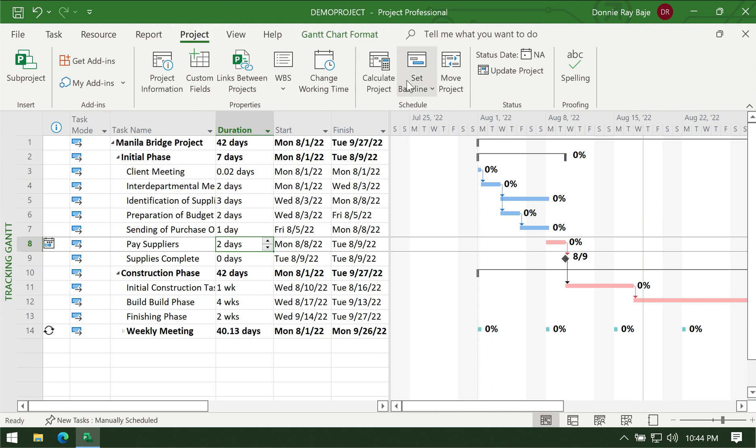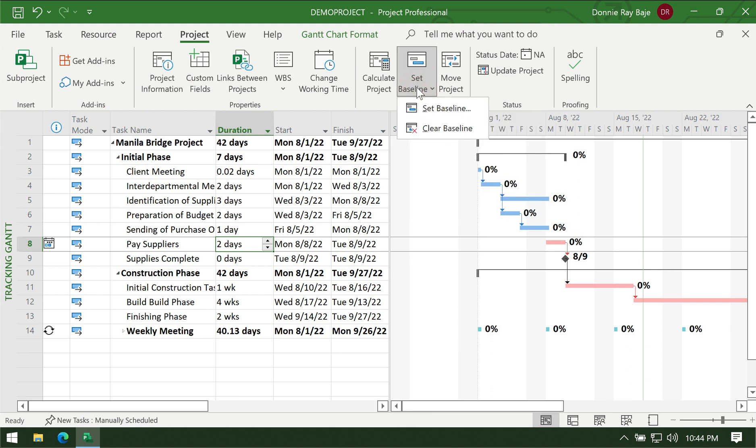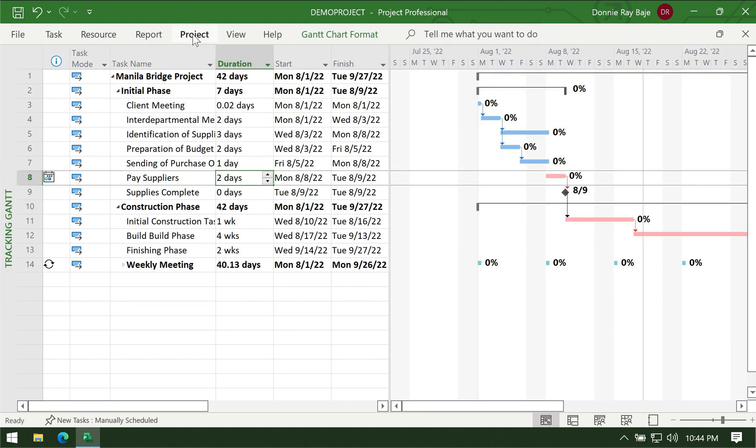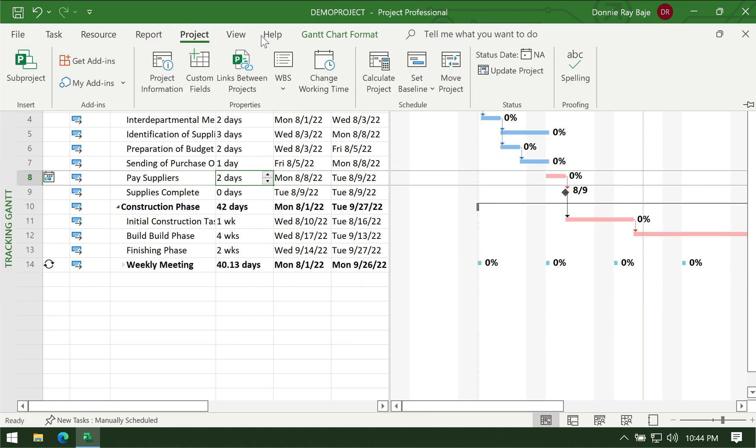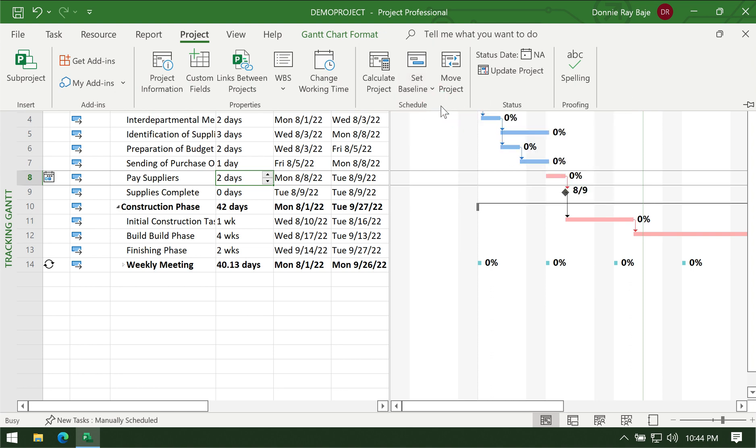You have to first set your baseline in order for some reports to work so that you can easily see what was the before plan and what's the current plan or current updates. To do that, you have to use the Project tab and then go to Set Baseline.